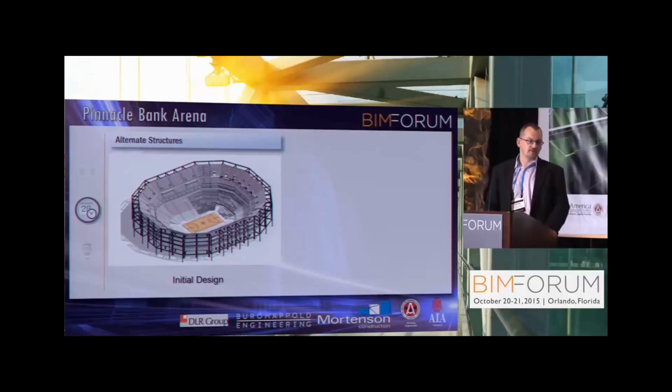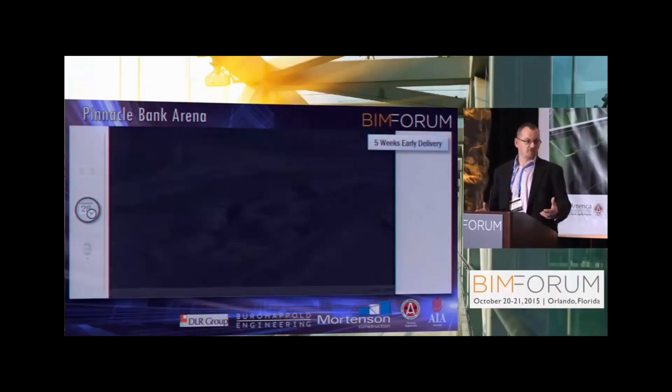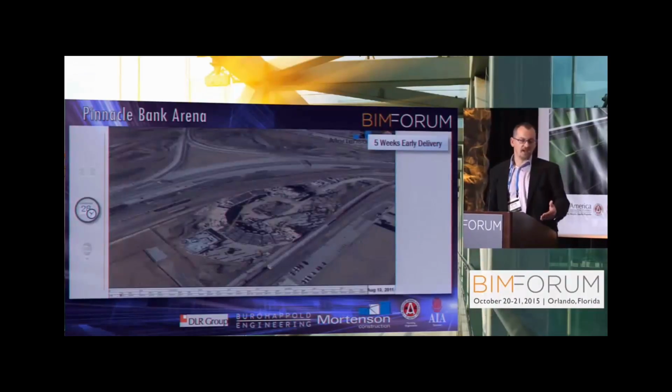And the initial design was basically supporting that kind of approach, but we looked with our design team together and analyzed what if we would approach it differently, what if we would build a hybrid structure where we shrink down the span of the main roof trusses from 300 to roughly 240 feet, I believe, and add the concourses as an addition after the relocation of the railroad tracks happens.